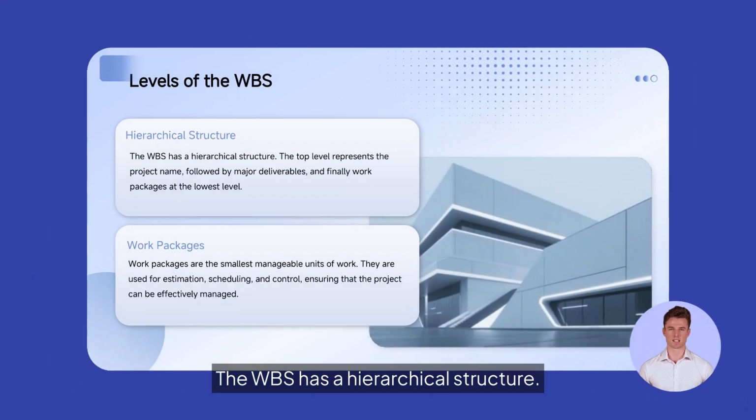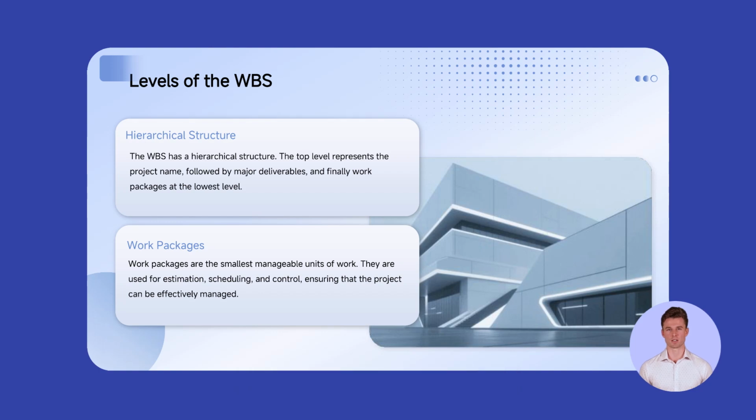The WBS has a hierarchical structure. The top level represents the project name, followed by major deliverables, and work packages at the lowest level. Work packages are the smallest units, essential for effective management.